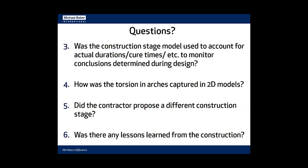Question: Was the construction stage model used to account for actual durations, cure times, etc., to monitor conclusions determined during design? Answer: We did some updating. We assumed construction would proceed end to end, but it actually proceeded in the opposite direction. We compared our results to an independent time-dependent analysis performed by the construction engineer, James and Spons, using their Bruco software, and we got very similar numbers in terms of long-term deformations of the arches due to creep and shrinkage at different time periods, which made us feel good.